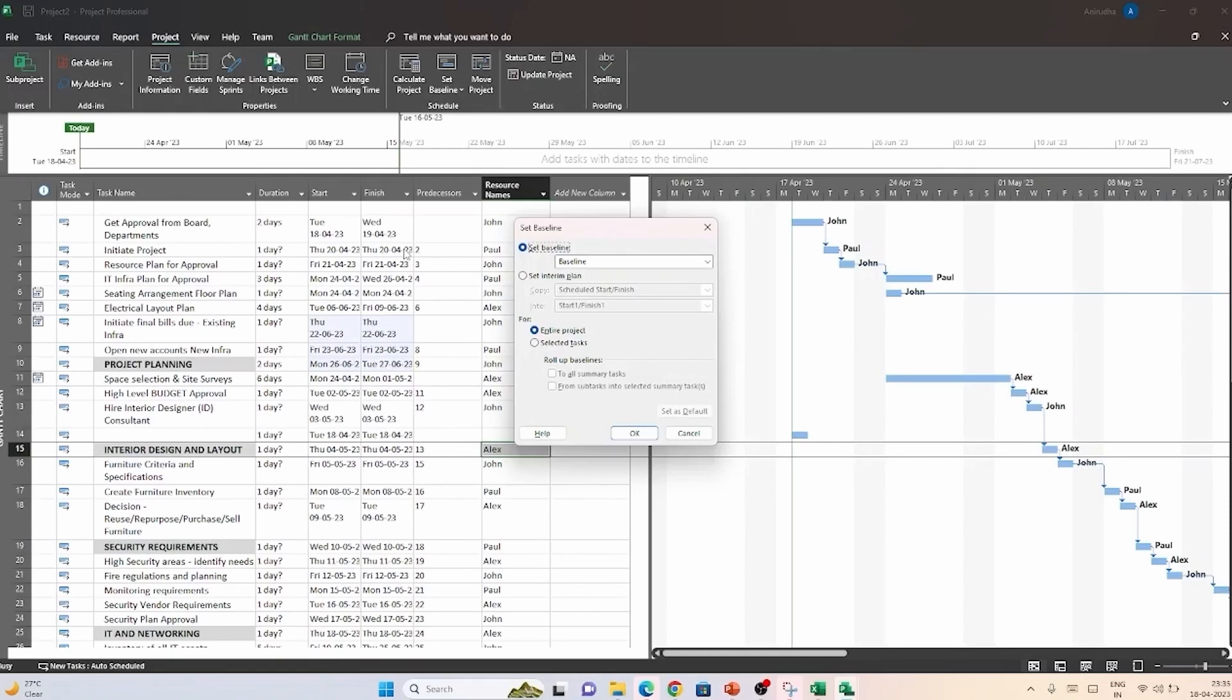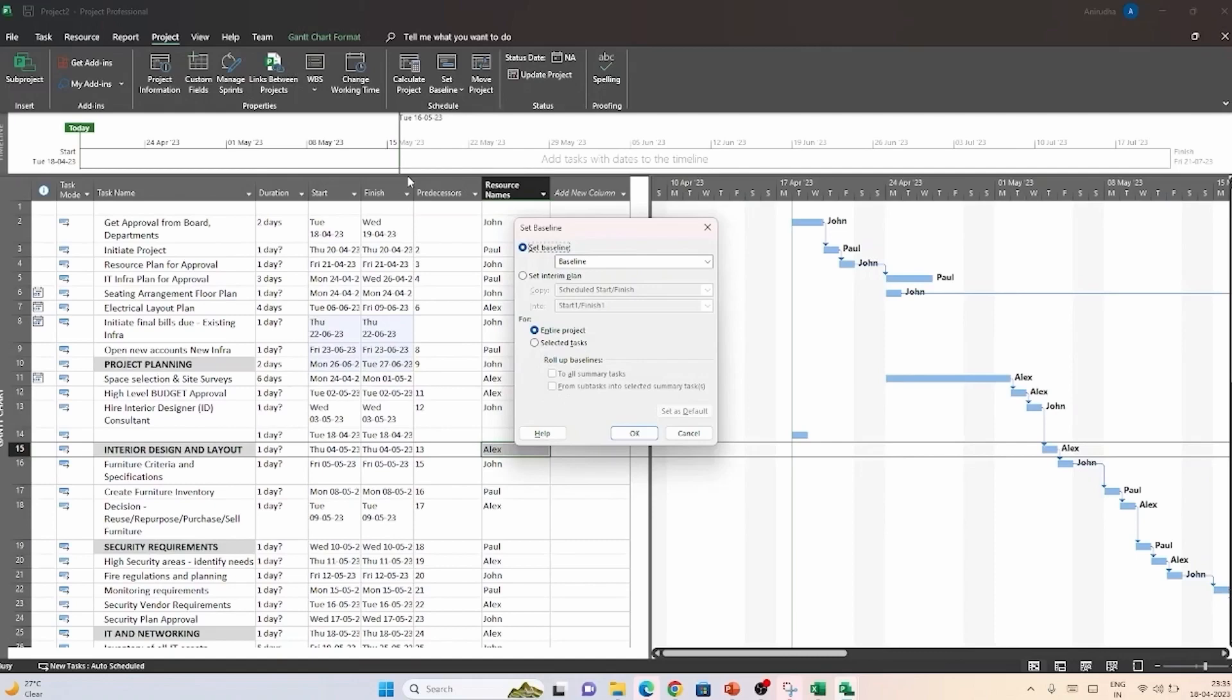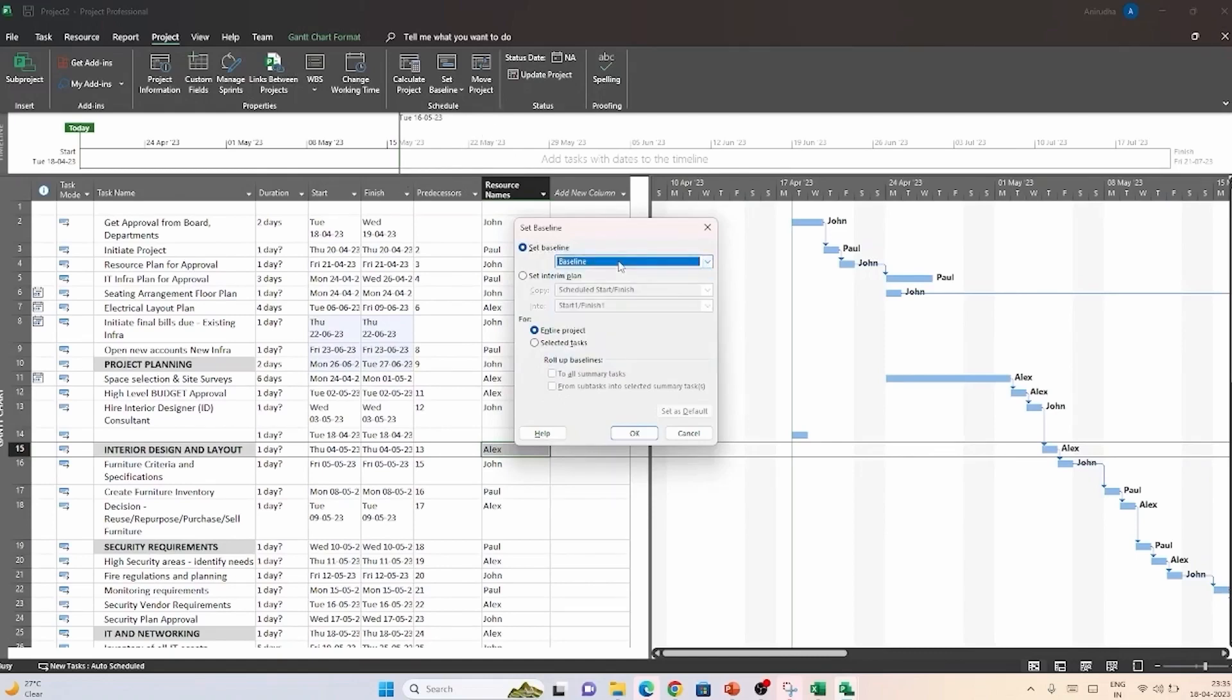In the first option, you can either choose between creating a baseline or setting an interim plan. Basically, what the set interim plan does, this is for work in progress files and you can keep saving incrementally progressive versions of your plan. This is not what we want to do currently. So, I will remain with the set baseline option. Now, in this dialog box here, you can see that option baseline is chosen by default. But when you expand this list, you can see there are other 10 more options.